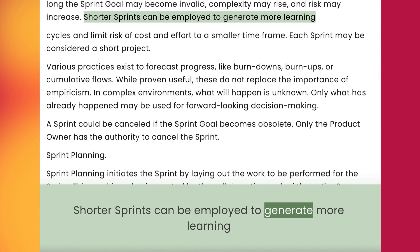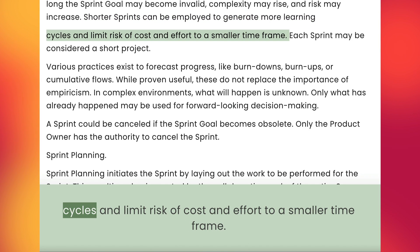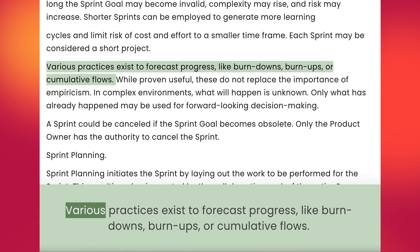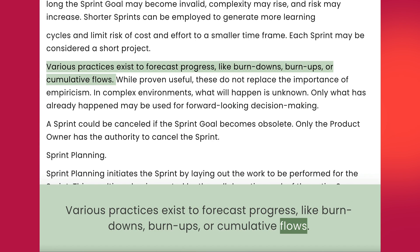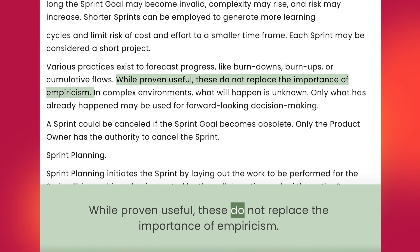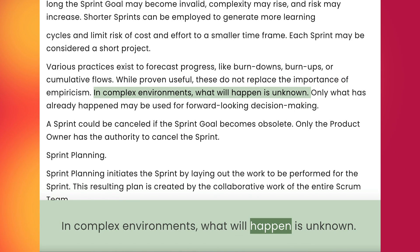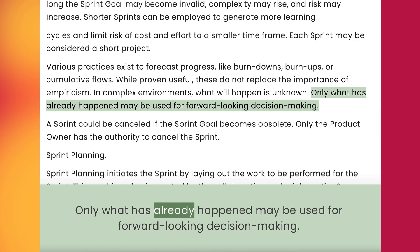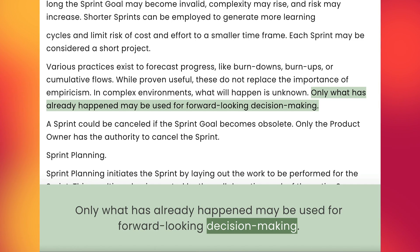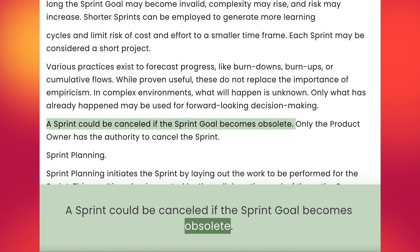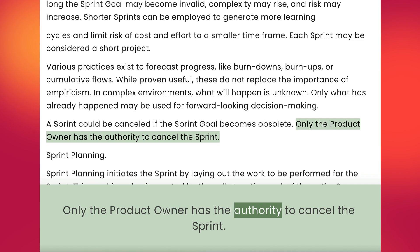Shorter sprints can be employed to generate more learning. Cycles limit risk of cost and effort to a smaller time frame. Each sprint may be considered a short project. Various practices exist to forecast progress, like burndowns, burnups, or cumulative flows. While proven useful, these do not replace the importance of empiricism. In complex environments, what will happen is unknown; only what has already happened may be used for forward-looking decision making. A sprint could be cancelled if the sprint goal becomes obsolete. Only the product owner has the authority to cancel the sprint.